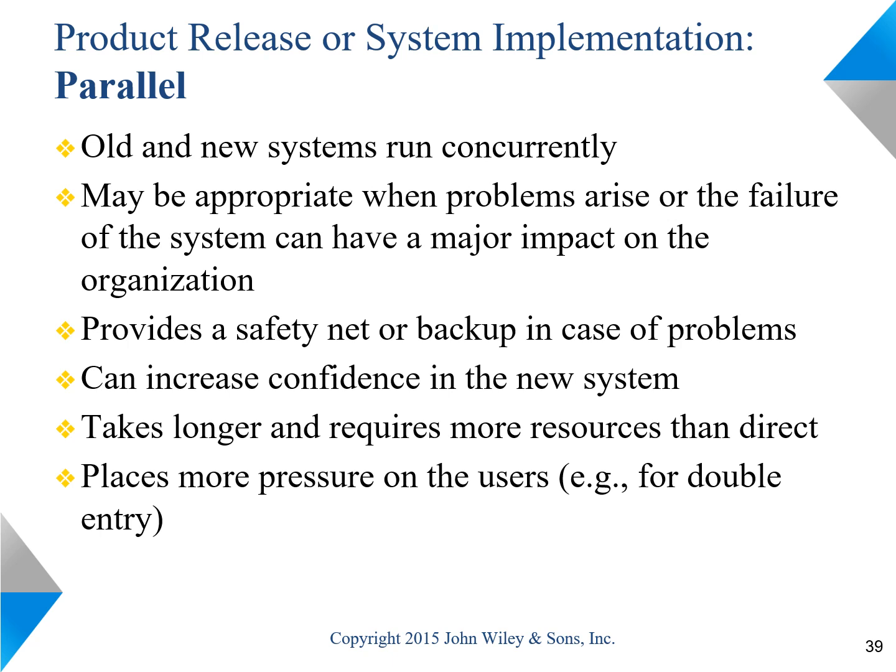This was also a point that we considered when we chose that implementation approach, because some courts were generally more risk takers and they were okay to use the new software, and they knew that they would be dealing with more bugs and so forth, but they liked to be first to new technologies, and some other courts prefer to have a more proven technology before they adopt it.